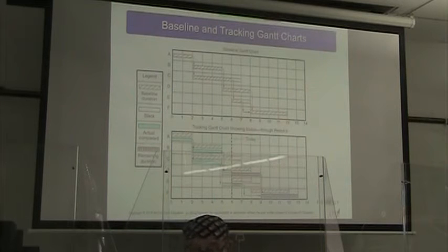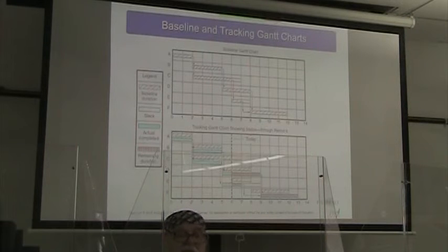Now, will we actually need all of these times? Well, the bottom chart shows the baseline versus the actual, where A and B both take the scheduled amounts of time, but C actually finishes a time period early and thus feeds into E, ready to go.